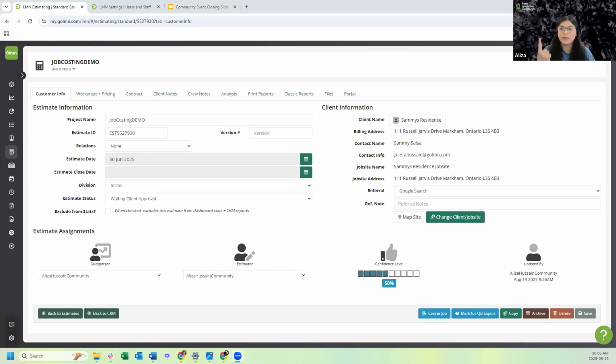There are four fundamental things that we look out for when we're job costing. The first is direct materials. These are raw materials used in the job, like mulch, sod, and concrete, all of which can be tracked in job costing. Direct labor includes your crew wages and time spent on the job. So exactly how much does it cost you to put your crews out in the field? Job costing will accurately track that. Along with equipment and subcontractors. Think usage based when you think about equipment and subs. This covers your equipment and fees from outside vendors.